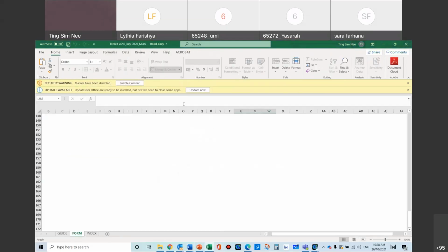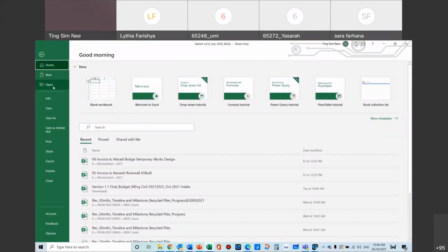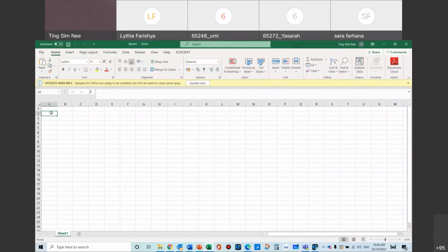We can use Excel to do this as well. We open the Excel file. You would have the general topic, like what is this project, so you have a project name. Then, if you have major phases or stages, you can name them properly as well, but that shouldn't be counted as a layer. Depending on the project, you could split this into four.